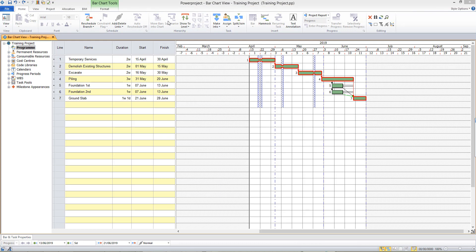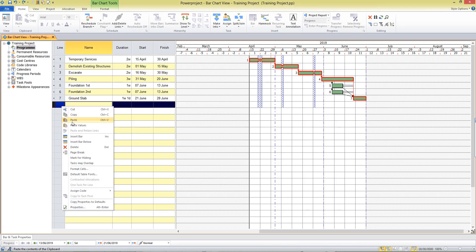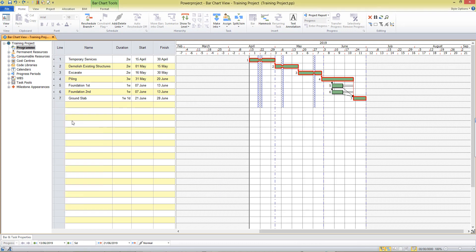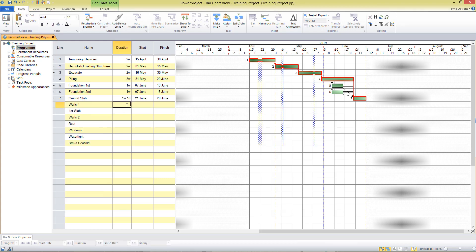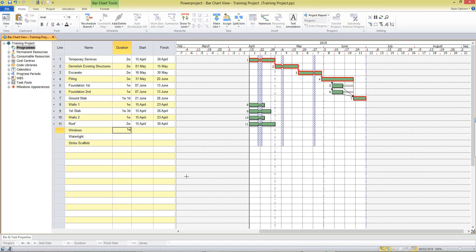We'll now type in some additional tasks into our project and plan the durations for these. If I enter eight days notice that in the table it will round up to one week and three days. Enter durations in daily or weekly units and when it comes down to watertight and strike scaffold they are going to be milestones so I enter a zero duration. Now to link these tasks to the existing tasks.